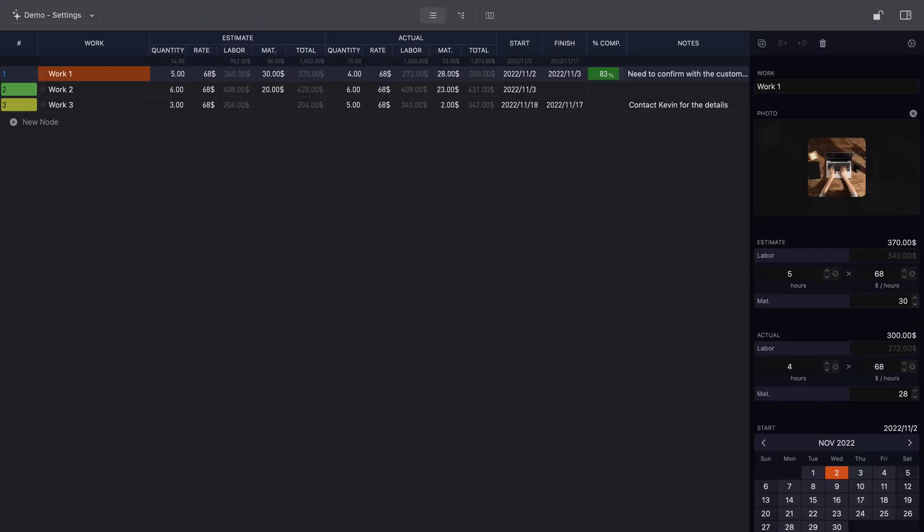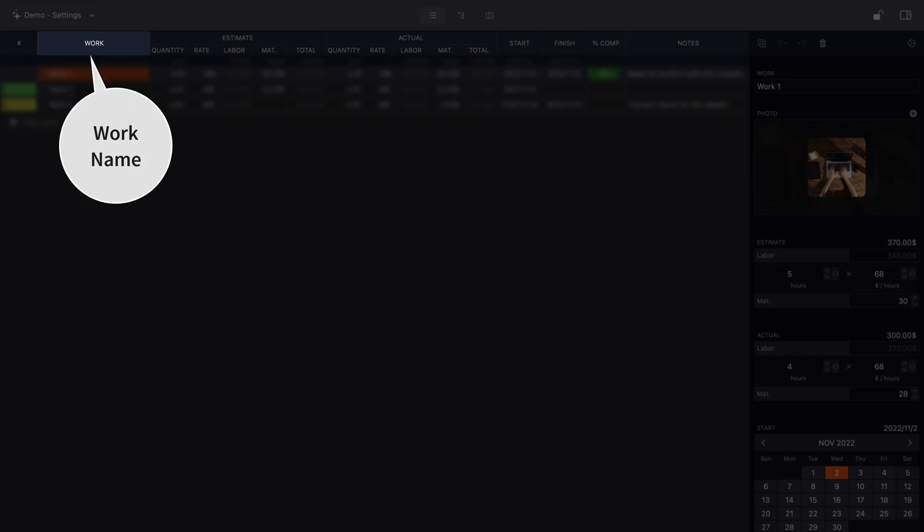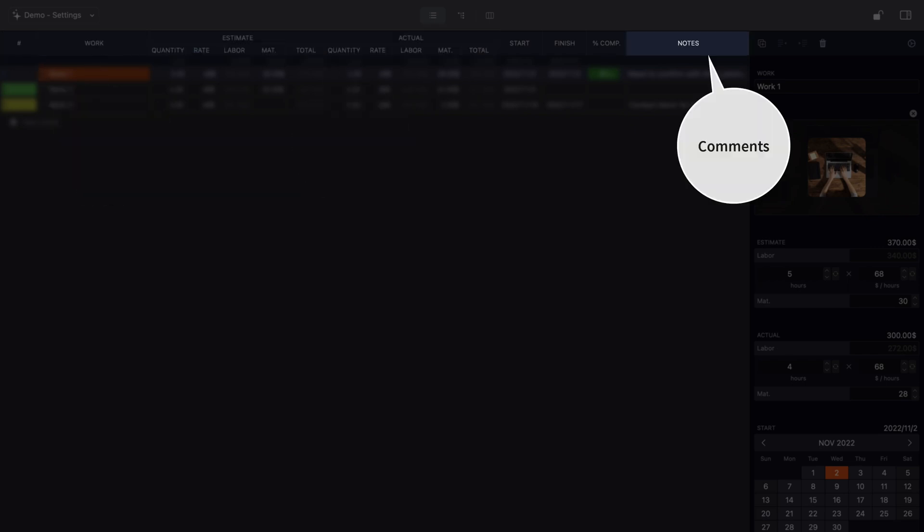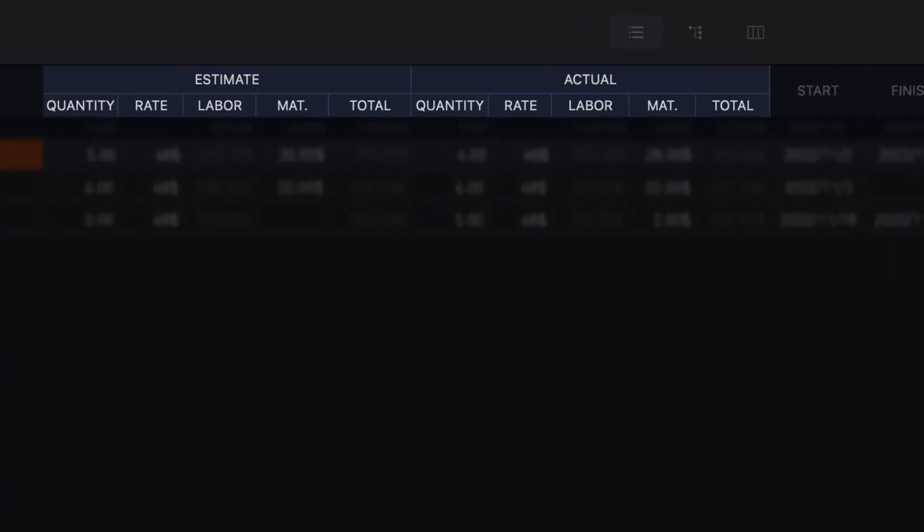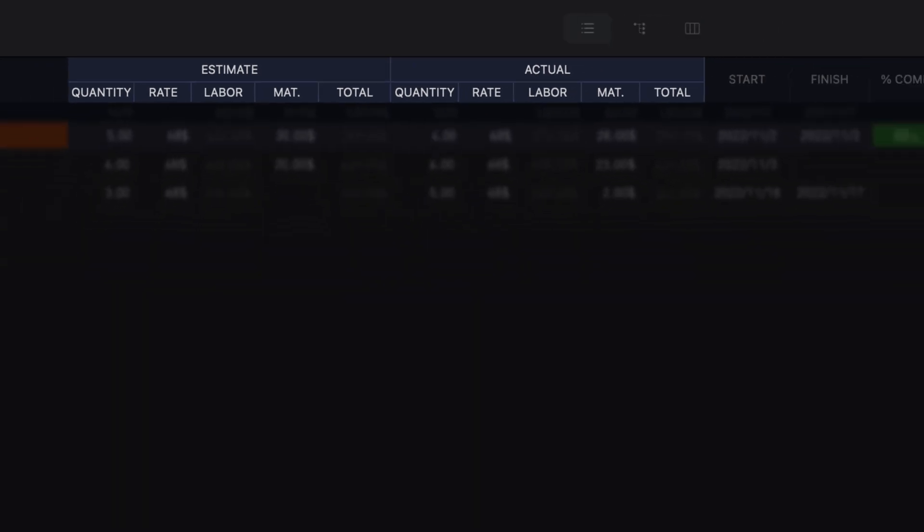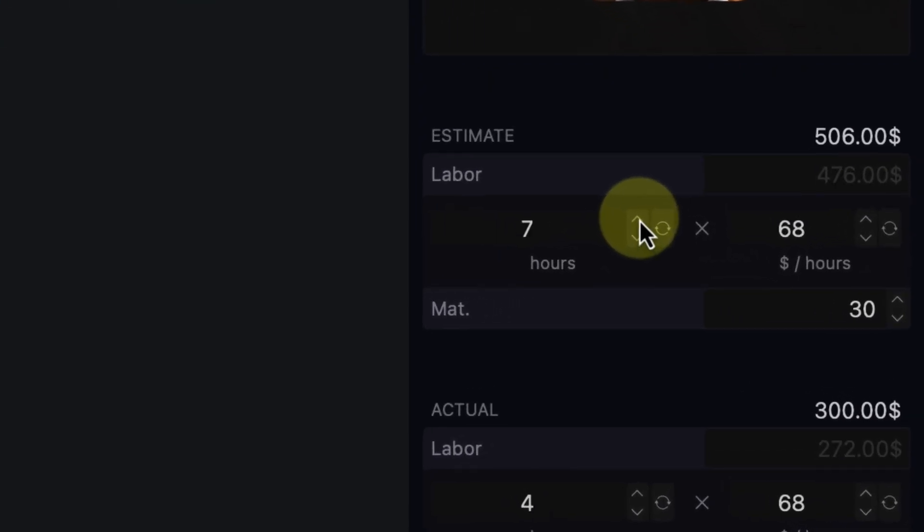Below we show you how to set up an ordinary WBS document. Fields entered and displayed in this document include WBS number, work item name, cost, and comments. Costs are divided into estimated and actual groups and include labor, material, and total costs, with labor calculated using labor hours and labor rates.